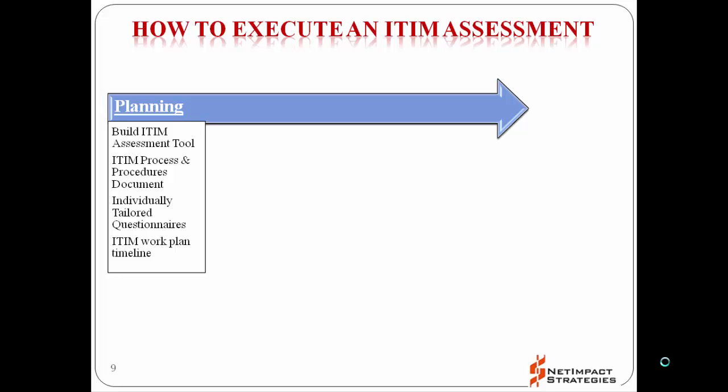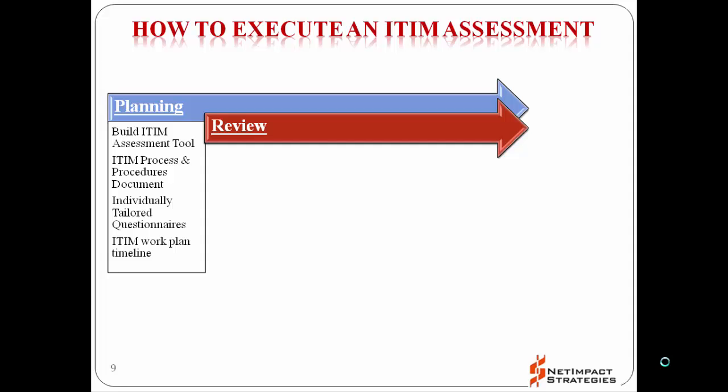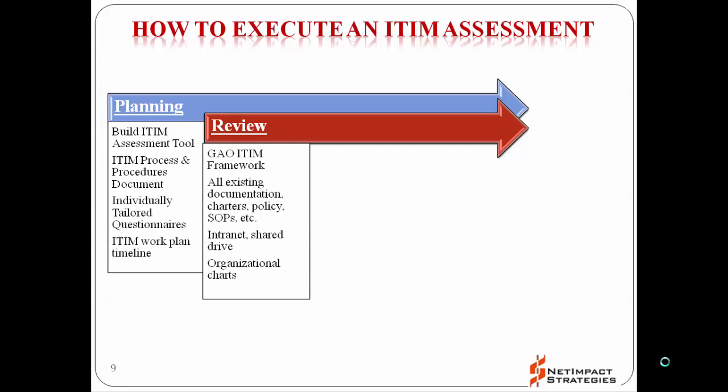This is also when you have to start thinking and planning for interviewing leadership and subject matter experts. Collect a list of SMEs and other stakeholders that would be useful to interview for the assessment. Then assemble a list of questions on how ITIM is currently being done and group it according to the area of expertise of the interviewee. Because the last thing you want to do is waste anybody's time on asking them questions they may not have insight to. Finally, draft a project timeline for how you will execute this assessment. How long will each task take, and who will sign off on the completed milestones?